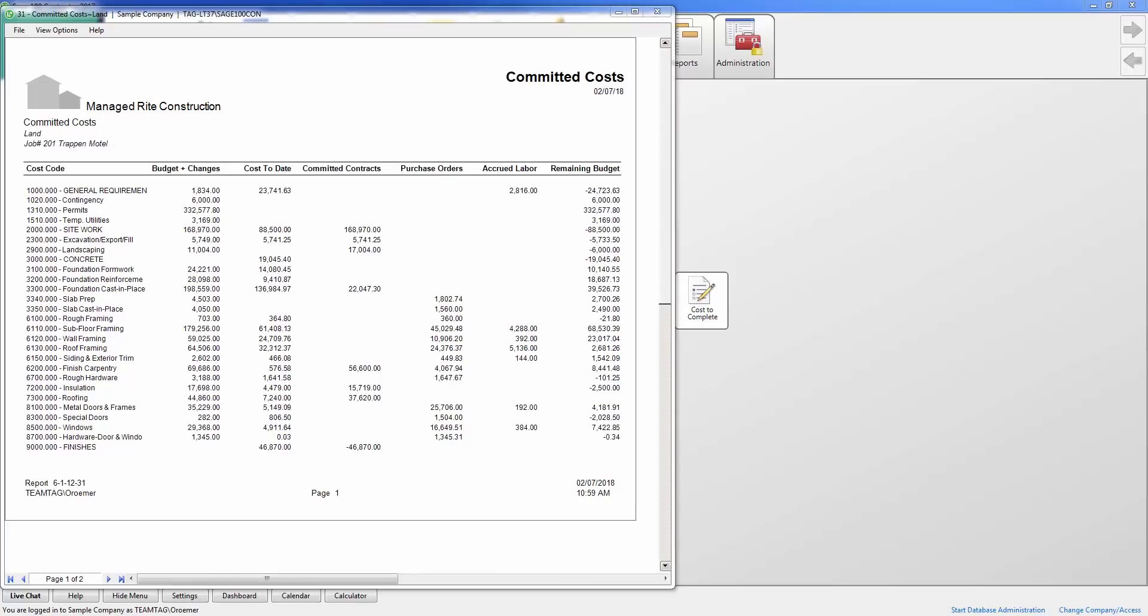The committed cost report shows the revised budget, cost to date, subcontracts, purchase orders, accrued labor for payroll that has not been processed yet, and the remaining budget by cost code.